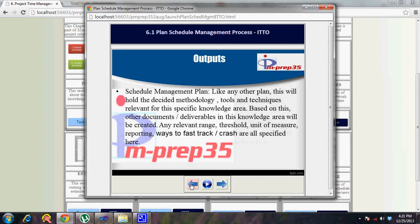Enterprise environmental factors must be considered during the planning process, and organizational process assets help you reuse prior experience. Meetings are conducted to come up with the schedule management plan, which documents methodology for the different processes in the knowledge area — what tools can be used, what techniques, what best practices, how monitoring and controlling will happen, and how often. For example, develop schedule will have an entry stating what tools will be used, what process will be followed, and what resources are needed — viewing everything from the time perspective and documenting details about all processes in this knowledge area, including tailoring guidelines specific to the project.